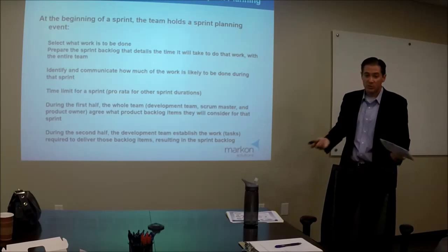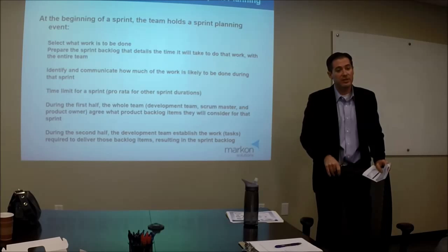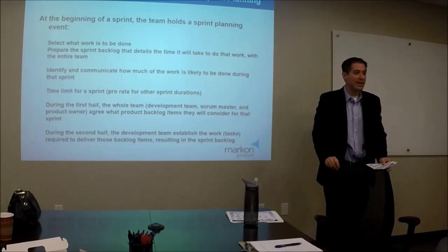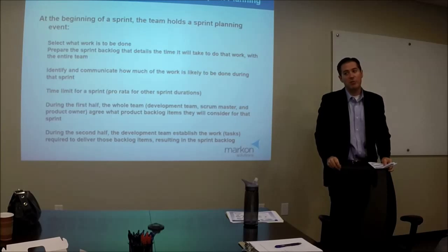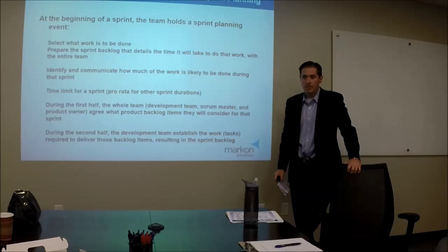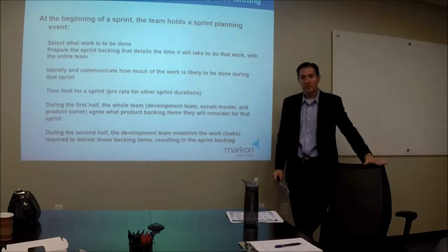But the planning meeting is where that's decided. At the end of the planning meeting, hopefully the product owner says, yes, if you deliver this in 4 weeks, we'll be good. If the product owner says, no, this isn't going to get it done, the team doesn't just go back to their desks and say, forget it, the product owner's not happy. So that process in the planning meeting is a confirmation of requirements to some degree. This is what we're going to do for the next 4 weeks. Are you going to be happy with that?